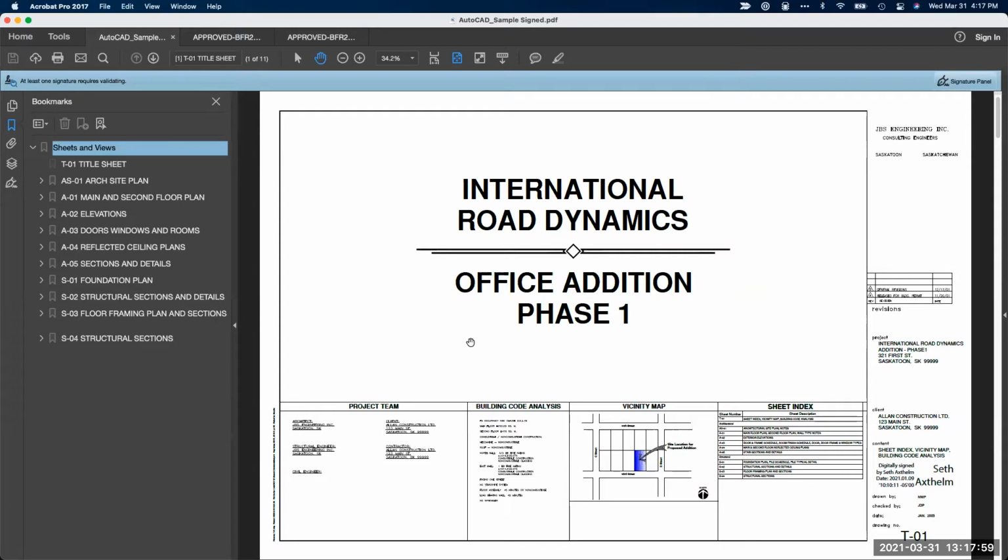Once we've separated them out into the individual plan sheets, we are going to uniquely identify each page by its sheet number. And the reason we're doing this is that from this point going forward, we are going to be versioning your submissions. We're going to be versioning your plans at the page level. And what this allows us to do is support a process called digital slip sheeting.